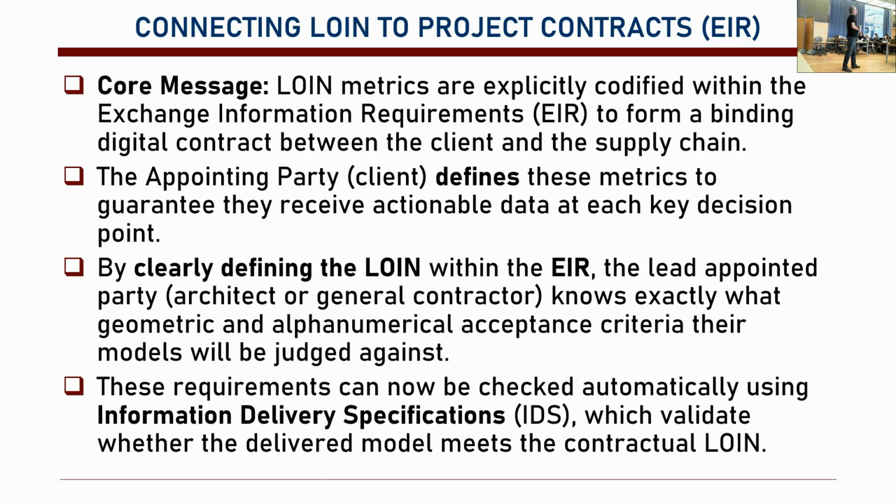And that job is a huge job, and the client's exchange information requirements, EIR, which I mentioned in the second or third week, I guess, is 1,700 pages. They define everything. I want this pipe at this time, I want this roof at this time, at this detail, etc. So they're all clearly defined.